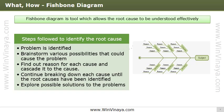Step two: identify the main causes contributing to the effect. For the main branches, you can use categories. For service industries, the eight P's are used: people, product, price, promotion, policies, processes, procedures, and place. For manufacturing industries, the six M's are used: manpower, method, measurement, machinery, material, and mother nature. You can also have customized categories.